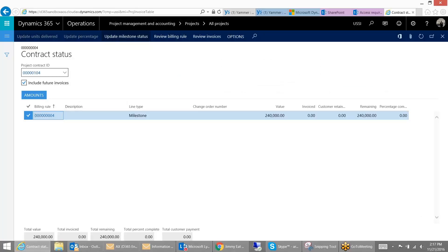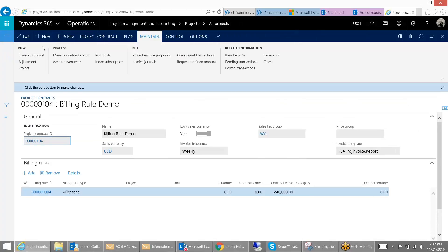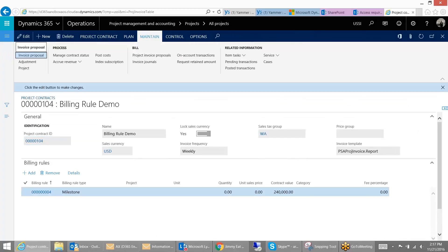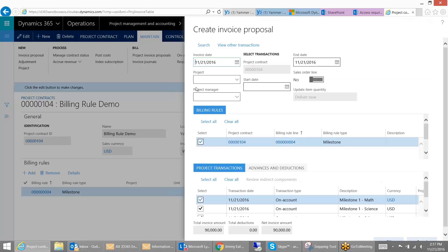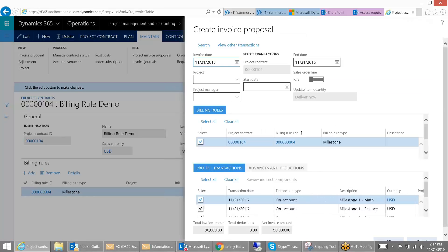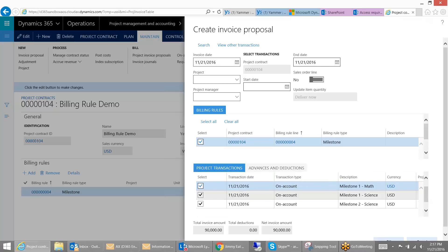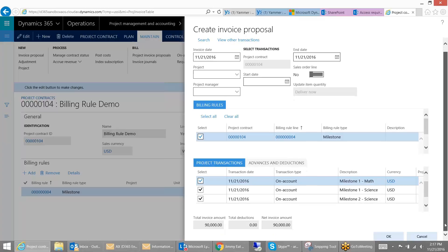And now that I have updated those milestones, I can then go into my contract and create an invoice proposal. And within the invoice proposal, you see we have the three transactions that we released. And these are the ones that are available to bill. So it doesn't matter which of the sub-projects that this contract is being billed for. You can all do it from a central location. Go ahead and press OK.